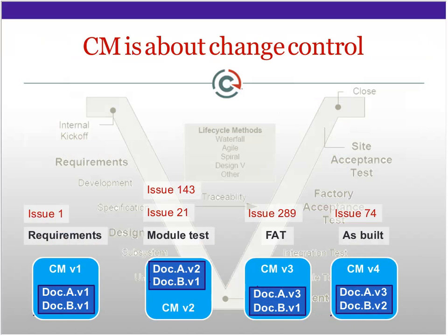And the best thing, of course, is to also register these issues in such a way that you can link them to the version changes and the snapshots you have taken. This is, in my opinion, full-blown configuration management: not only version control, but taking snapshots of complete system configurations and also relating the changes that have led up to these versions.